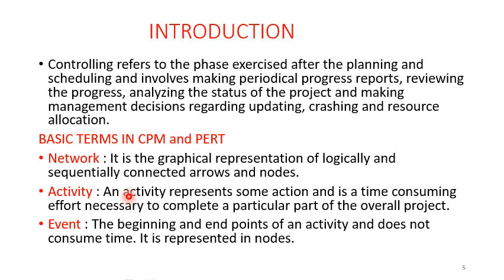Activity 1 and activity 2, or in other words, activity A and B. Let us take minutes as a unit of time. Activity A takes 10 minutes and activity B takes 2 minutes to complete, and both are required for the completion of the project. But activity B can only start after activity A is completed.